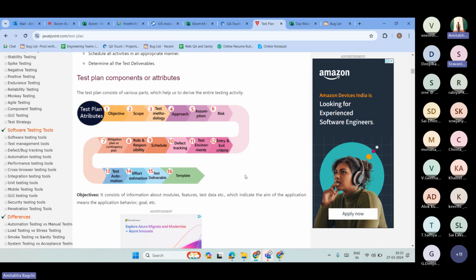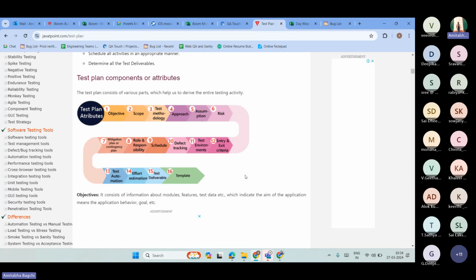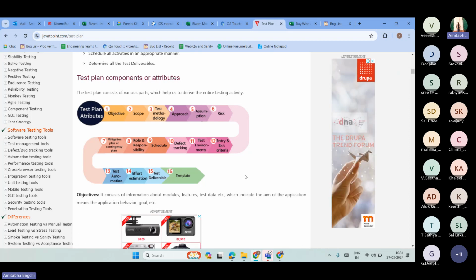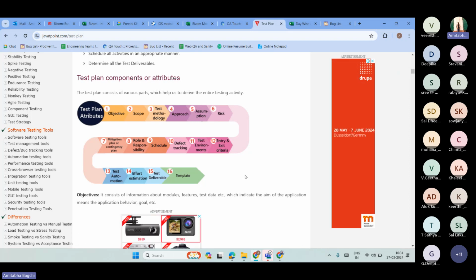For the feasible test cases, what tools and libraries are we going to use, what framework, what reports, how are we going to write our test scripts, what features are we going to introduce, how many days it will take, and which particular persons in the team would be involved in particular modules. The feature involves a number of modules. Me, Amitabh, will do the login module. Saujana will do the cart module. Like that, there would be assignees, and they will give the timeline, how many days it will take for them to automate.